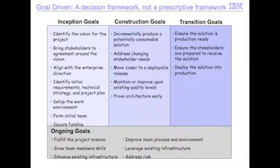What we mean by that is that at the beginning of a project, there are some common goals that you need to address. For example, you probably need to identify some initial requirements and come up with a technical vision or technical strategy for how you're going to address building this system. You probably have to set up your work environment, form the team, secure funding, and other basic fundamental things.